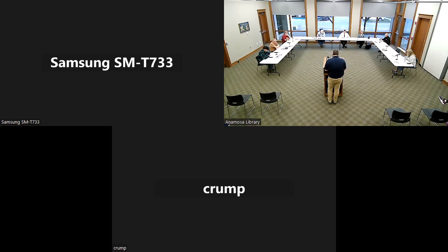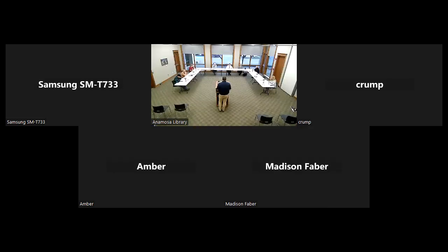6. So 6 is in front of the nursing home on Rosemary. They ran into cobblestone and limestone there that we did not know about. They are asking to adjust the unit price for the trenchless installation method in part 6. And then they're requesting additional days for potholing for the existing force main and utilities.